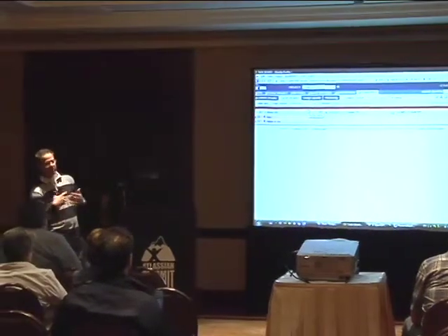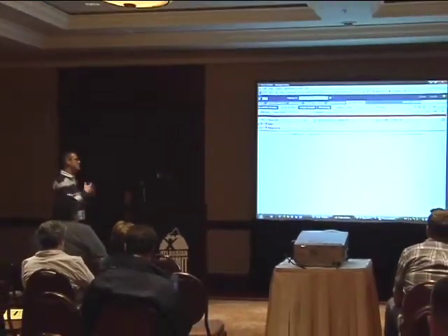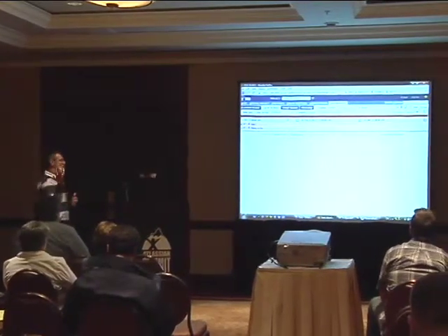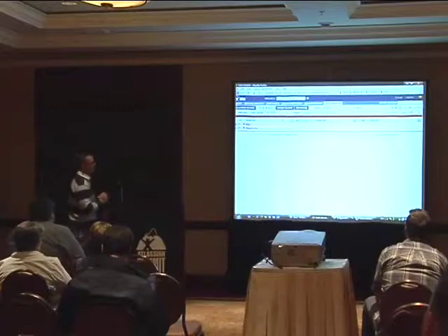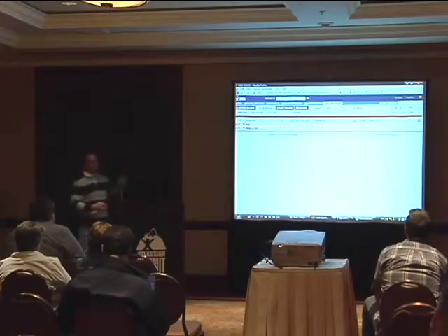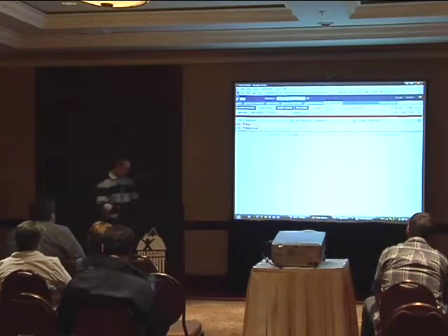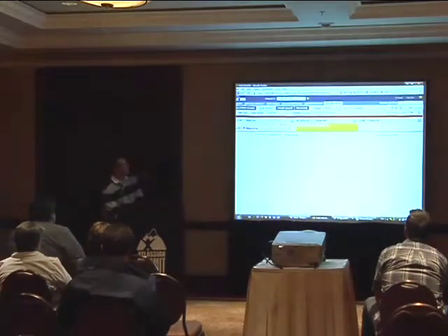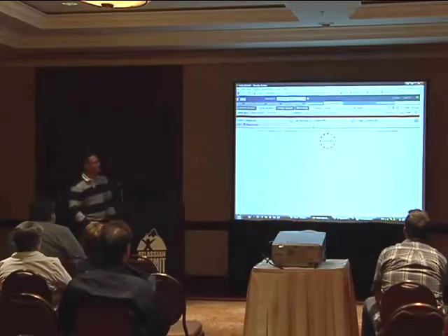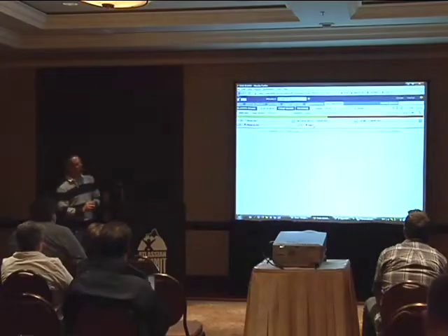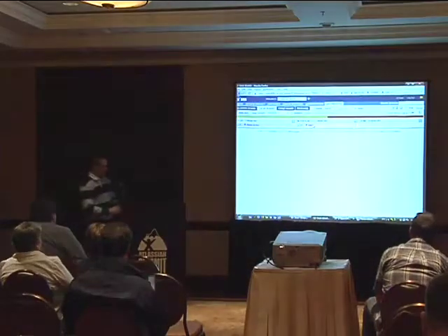You can add columns. Of course, this is configurable, but built in, there's 3 columns: the to-do, in progress, and done. You can map any workflows directly through your columns, so you can actually map statuses to your columns. And to quickly update your statuses, you simply drag and drop. For instance, you start working on the bug, you put it in progress, and it'll put the bug in progress.